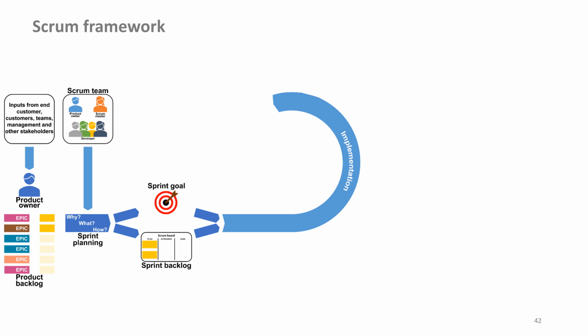That is what you do in a sprint planning. Here we say we think we know, freeze those assumptions, and take them as true. Well, after a sprint, we look to see if we were right. In the worst case, our assumptions are wrong, so we have developed past the point. 4 weeks is the maximum that can be tolerated in such cases.